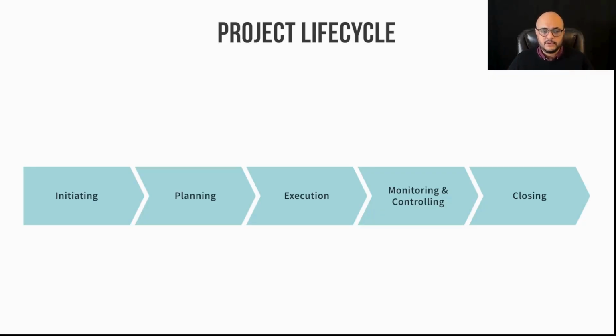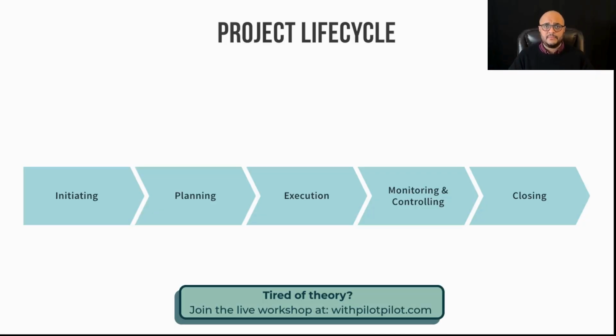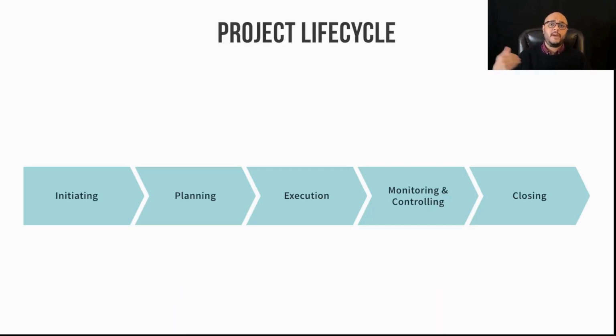And finally, closing. Closing isn't simply saying, all right, well, we've built your house, off you go. No, there needs to be signing off on contracts. There needs to be handing over of documentation. So you've developed an app. How do I use it? How do I get into the back door to figure things out? There needs to be documentation, training for the client, handing the project over to the client, showing them how they're going to proceed from this project into the operations phase. Remember the difference between projects and operations. How they're going to run their day-to-day tasks using the deliverable we created through this project. So, 5 really, really important stages of the project lifecycle.